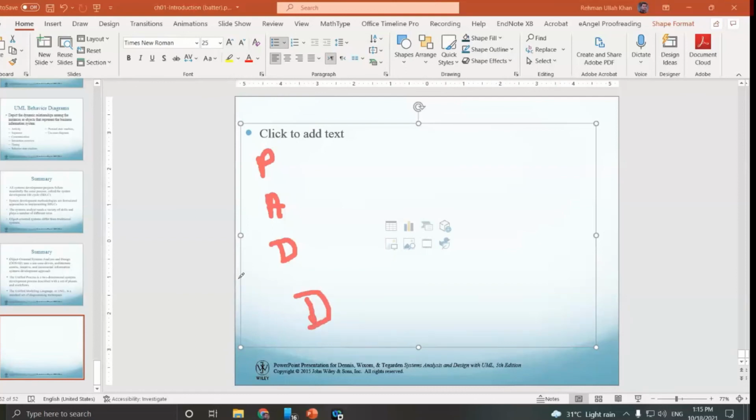Okay, but the V model focuses too much on testing also. For example, in this case, when they plan something, then analyze for that, then design the interface and implement the real coding for that, you just think of one process being complete, then the V model does not go to another process until it designs a testing mechanism for that. So it doesn't go to the next level until this one is tested.